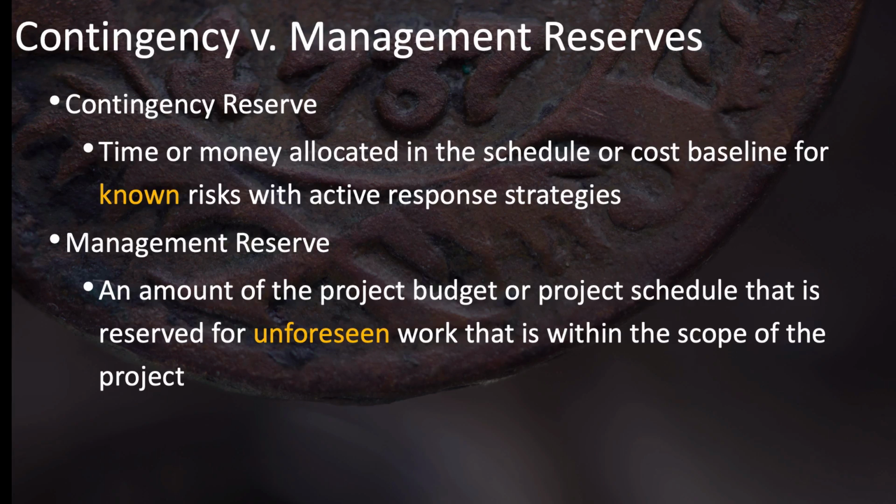Or even worse, what if you lose one of your key stakeholders, a key user, or even your project sponsor, and they need to be replaced with someone else who needs time to come up to speed, and you need to spend time and money helping them come up to speed on the project. This could also come, or should also come, from the management reserves.